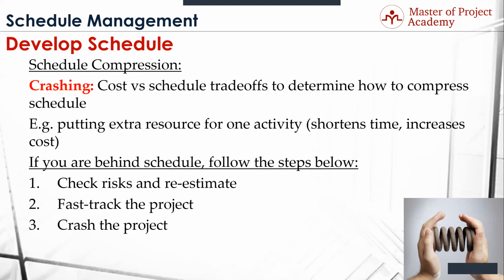And why would you not crash something that's not on the critical path? Because you've got float time to accommodate. Absolutely. You've got float. Now that float may be 1 day or 2 days, and there are instances where you can crash non-critical path things, but for the exam, just remember, don't crash unless it's on the critical path based on the float scenario. Okay?